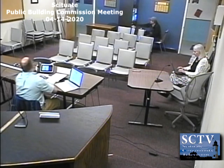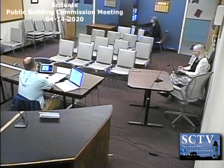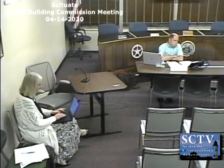We did sustain some wind damage from yesterday to the fence, the gates, the green scrim that's hung off the fence, and the trailer power wires were taken down, but unbelievably not disconnected by a down tree limb from a tree that was adjacent to the Cudworth house outside the work limits. But that's going to have to be addressed by National Grid and the electrical contractor. We have received our curb cut and street opening permits. We are still waiting for the sewer tie-in permit.